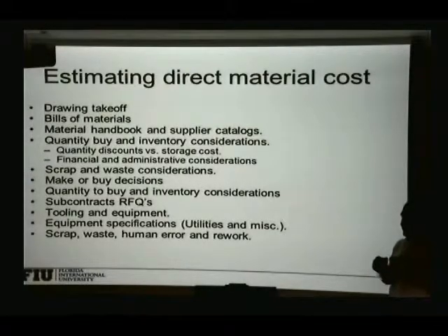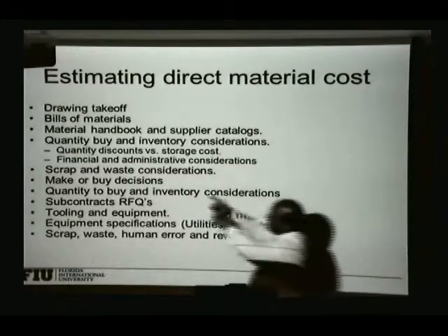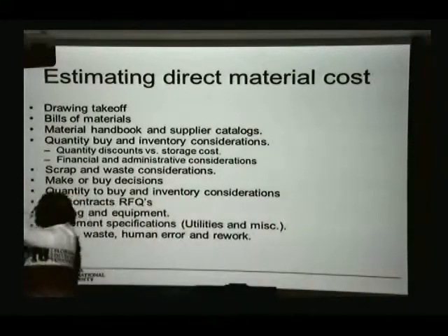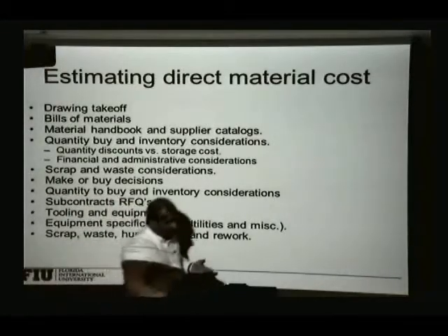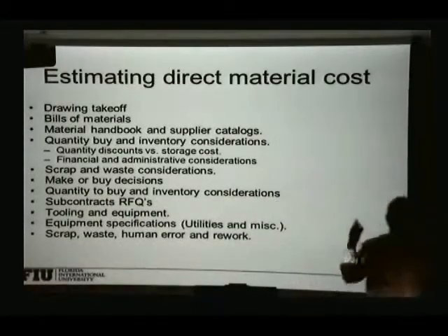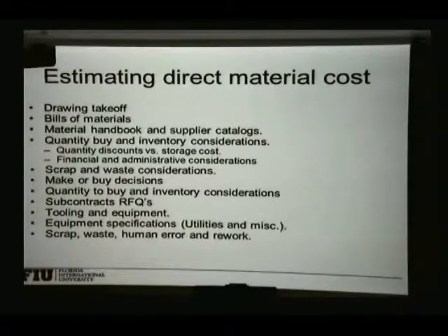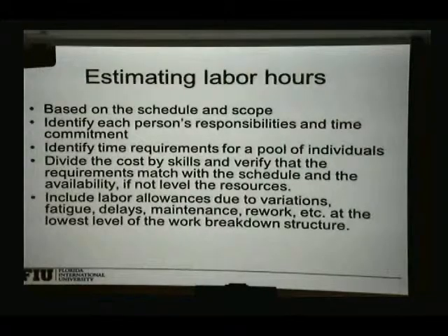You're going to be short in the number of tiles that you need. Because when the installer comes and puts them here, he needs to cut the section and throw that away. You're not counting that section that is being thrown away. So that's a small example that shows you that you need to consider the waste when you do your calculations. So I'm going to show you how to handle waste in the estimate.